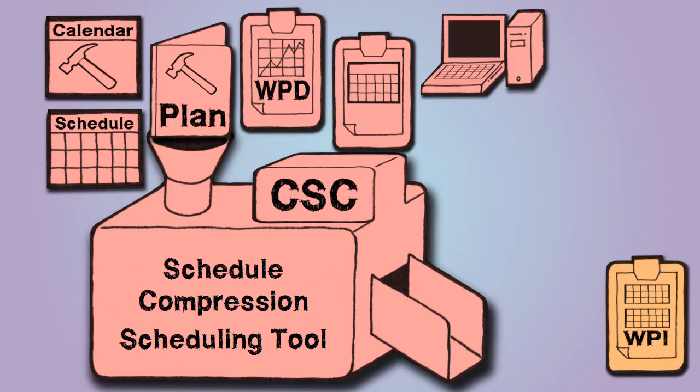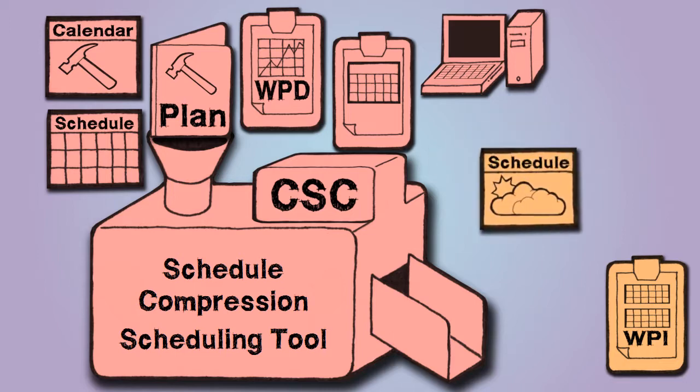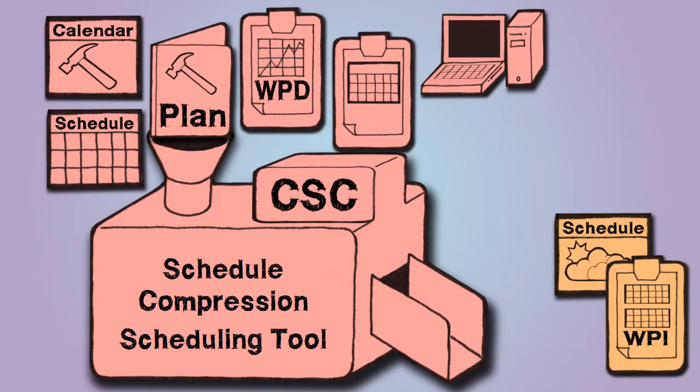Once the data is analyzed and put into context in the work performance information, it can be used to create schedule forecasts. Schedule forecasts utilize the earned value management indicator of estimate at completion, which can be used to predict the future performance of the project against the project schedule. When a project is being monitored and controlled, that's when the project manager will discover deviations that may require changes to the baselines. These changes are never made arbitrarily, and they require a change request in order to go through the Perform Integrated Change Control process.